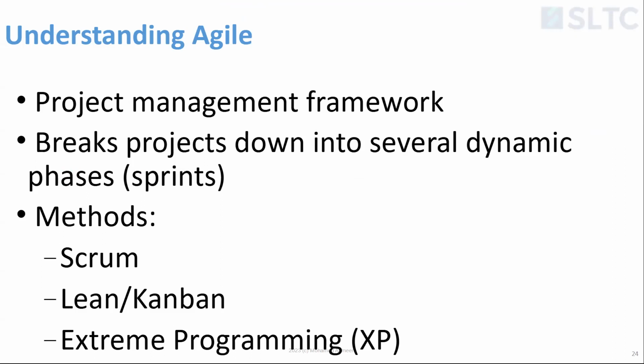So, for example, let's say you want to build a smart mobile phone. Now, that's a very complex task, but how can you do it? So you break it down. The first sprint can be designing the circuit board, PCBs, right? So that is your first sprint, and you bring in a certain time frame for that. The second sprint may be to bring up the bootloader or the software that you require to bring up the board, right? The third sprint might be bringing in the applications.